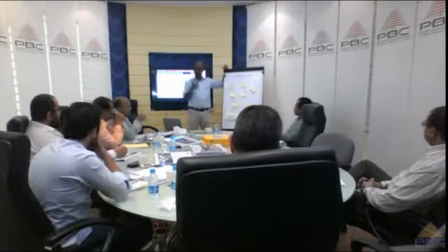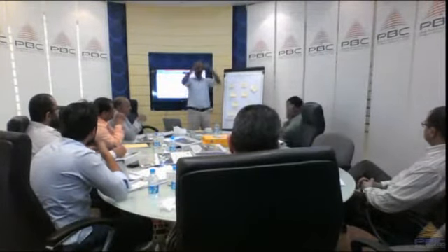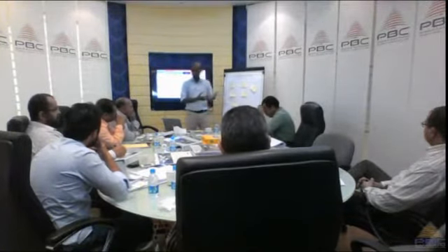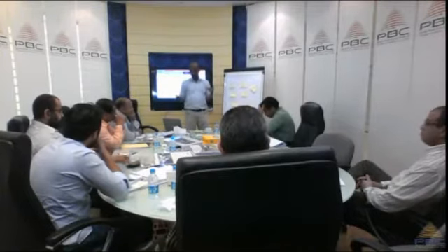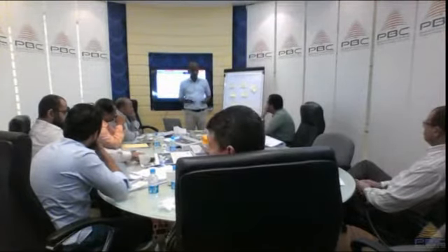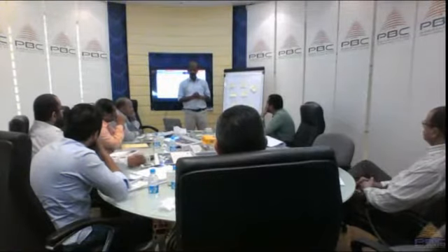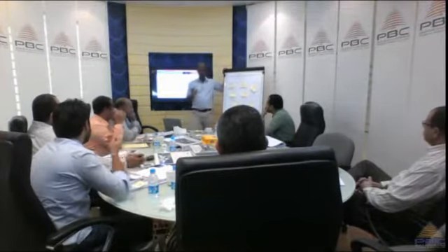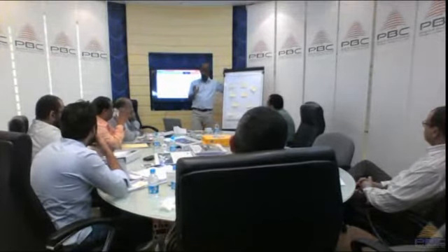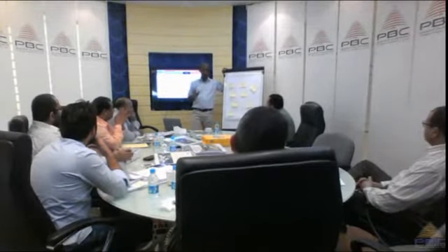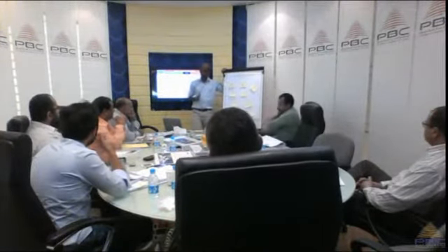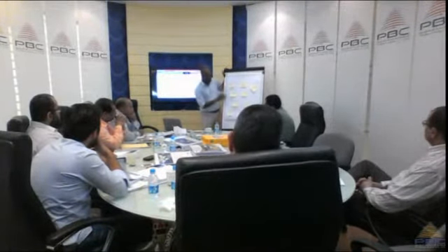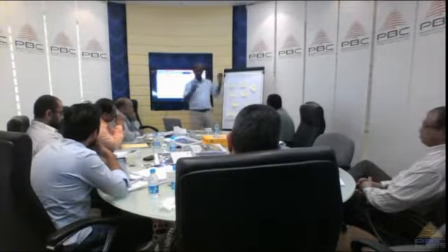And we say if an organization has high tolerance for risk, it means what? If you have high tolerance for risk, it means you can accept more risks than other organizations. If you have low tolerance, right, and if you have 0 tolerance, means what? If we have 0 tolerance towards risk, we should not accept any risk. Exactly. So we have to deal with all the risks. We cannot afford to have any risk not dealt with.